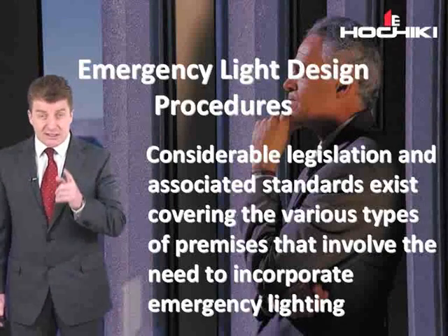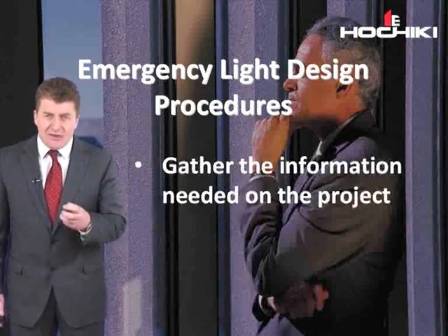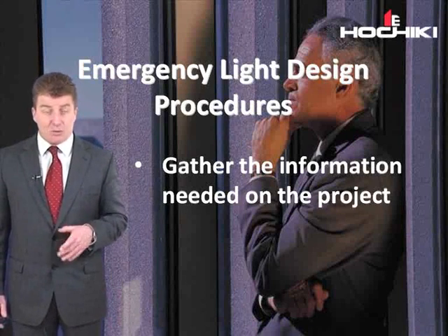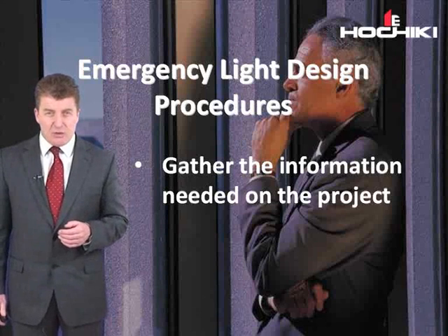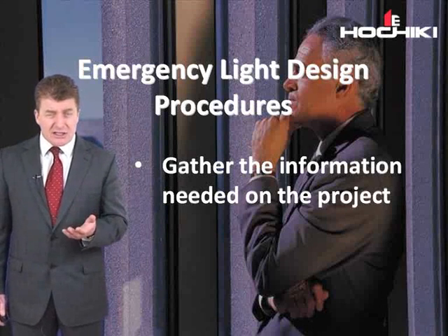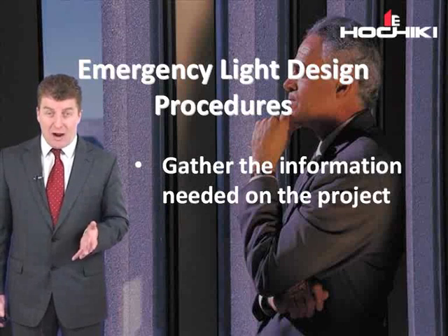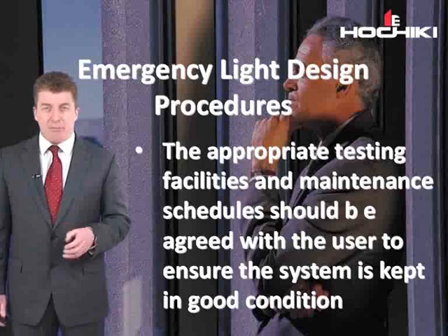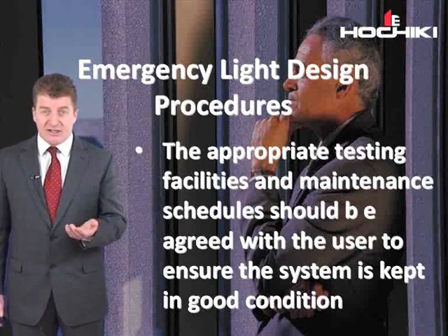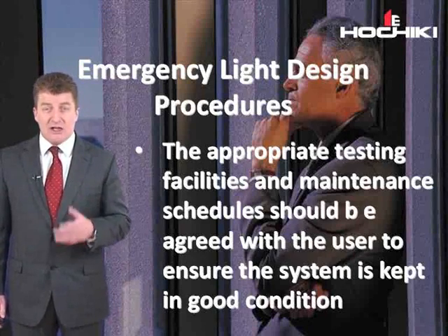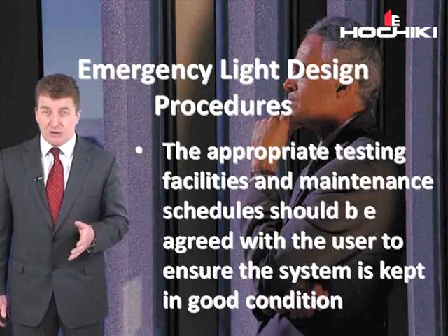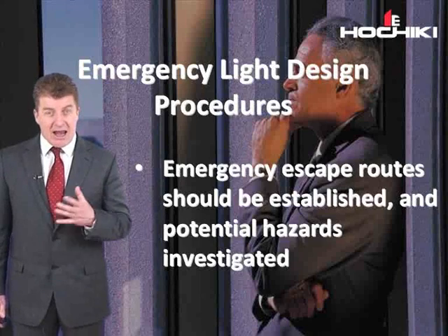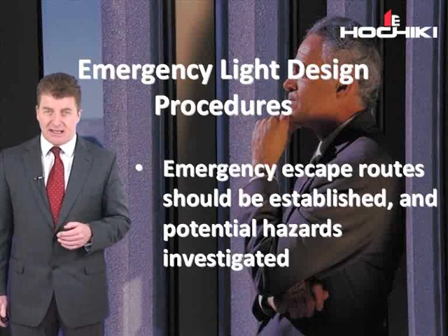Well, the first stage of system design is to gather the information needed on the project, get it all together, normally by consultation with the regulatory authority and the user. This should cover legislative and likely operational requirements, and you've also got to consider your customer preferences. The appropriate testing facilities and maintenance schedules should be agreed with the user to ensure the system is kept in good condition. Emergency escape routes should be established and any potential hazards investigated.